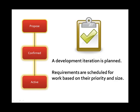After prioritization, a development iteration can be planned based on the resources available to the project team. Requirements are scheduled for work in this iteration based on their priority and their size.